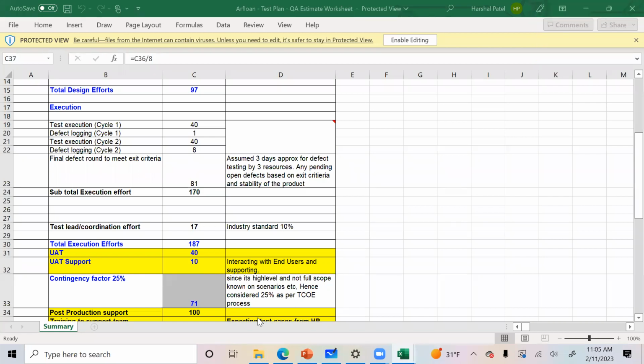So how does it fit into agile methodology? If we are following agile, even then it's a little bit different in the sense that you have a dedicated team and you're part of that team. But what it's going to look like is, hey, you are going to work on these 3 features in this particular sprint. So they're going to ask, how much time do you think you will need to build it? And can you get it done in 2 weeks?